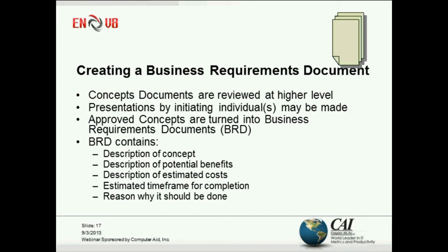The approved concepts are then turned into what I call a BRD, a business requirements document, which will contain a description of the concept, which can come straight from the concept review document, a description of the potential benefits, the estimated costs, an estimated time frame for completion, and then the reason why it should be done. This is, again, all straightforward. A very simple web page can do all that.